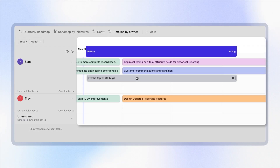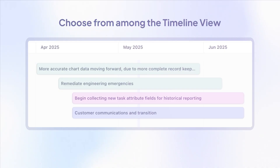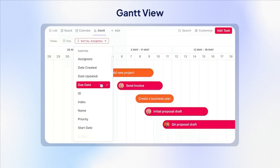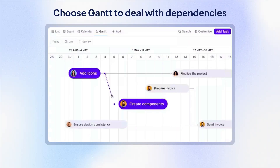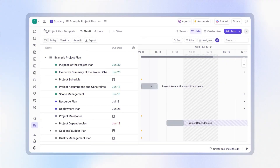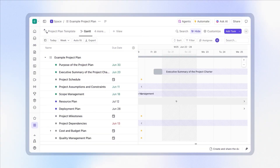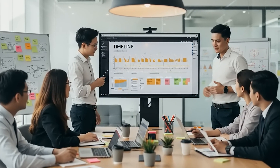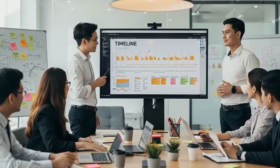In the sixth and final step, you bring everything together in a timeline. In ClickUp, you have multiple views to work with: timeline, calendar, Gantt, or list. If your project has strict dependencies or overlapping details, Gantt is the way to go. You'll map out when each task starts and ends, set dependencies, and adjust dates by dragging and dropping. This helps you avoid missed handoffs, manage workloads better, and keep clients or stakeholders in the loop with a visual timeline.